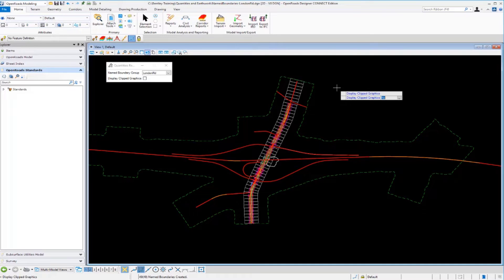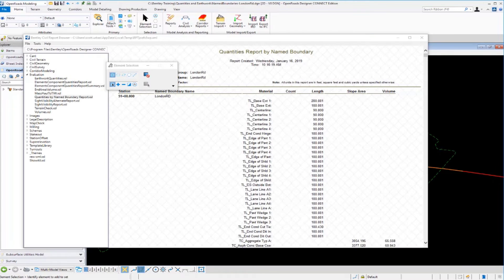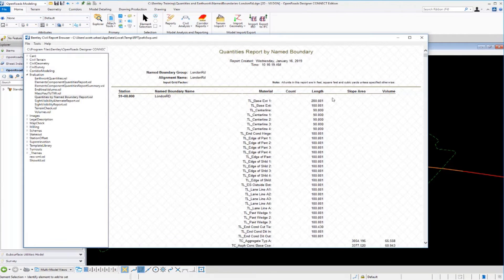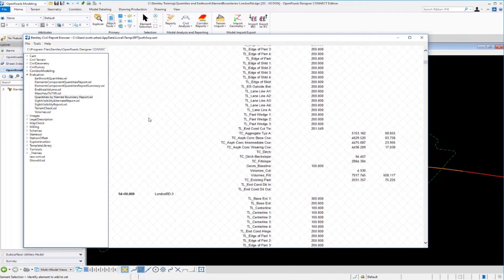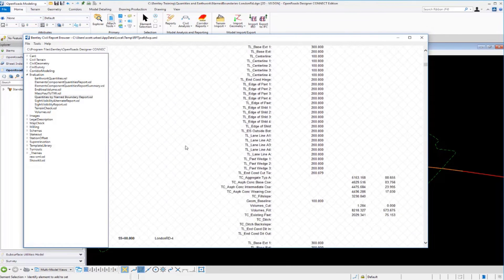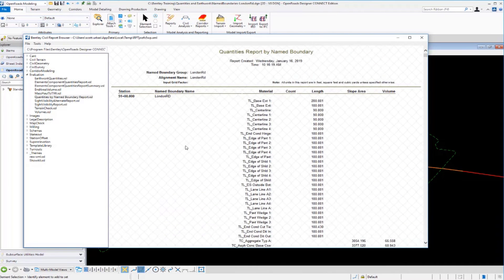Selecting No for Display Clip Graphics and clicking to accept, the tool analyzes the named boundaries and cut and fill volumes, generating a quantities report. This time the report includes station ranges — starting at Station 51+00 and incrementing every 100 feet — reporting what's inside each named boundary. The named boundary group names are also shown in the report.